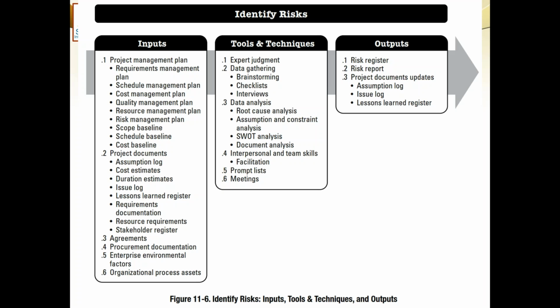Similarly, the cost management plan is as sensitive as the schedule management plan, and the estimates of schedule and cost are integrated together, especially with the resource management plan also, because the schedule estimate, which you call duration estimate, cost estimate, and resource estimate put together contribute towards the formation of the schedule, network diagram and all that. So therefore, these three management plans are important for me.